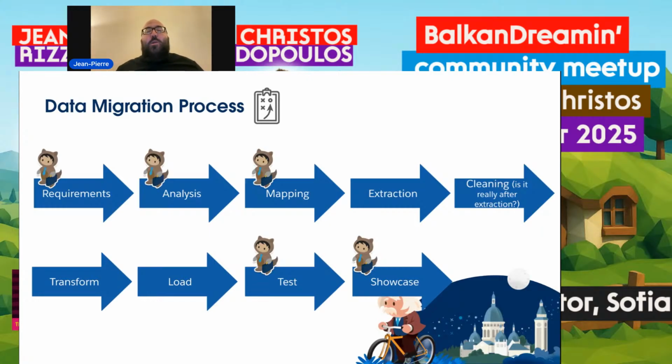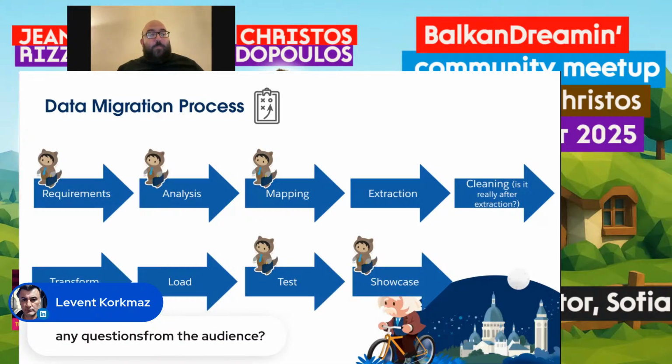And really, it should be a parallel job done very quickly in your data migration project, because you don't want that to be in the critical path once you go ahead with your project, because it could take a lot of time. Deduplication is a hard job. There are companies focusing on deduplication and data quality. So you want to work on that, or have people working on that very quickly in your project.